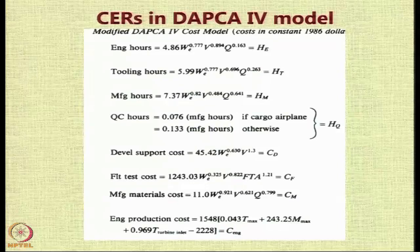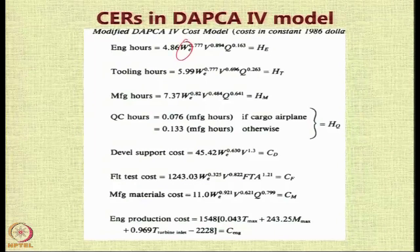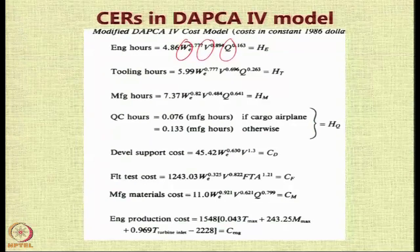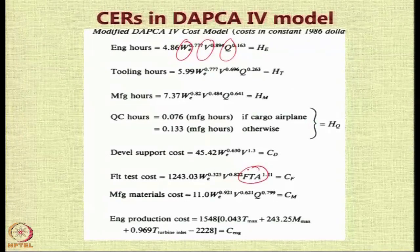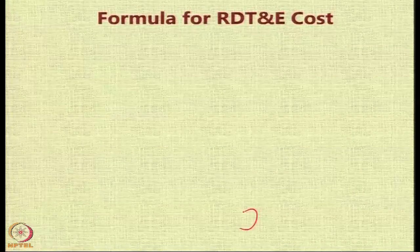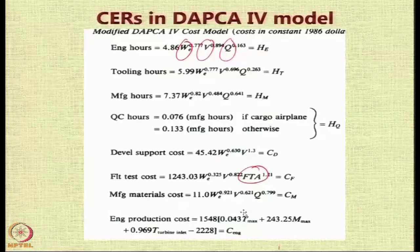What you need to understand is that the important parameters are the empty weight or DCPR weight of the aircraft, the maximum velocity, and the quantity to be produced. These are the three main factors, along with the number of flight test aircraft and maximum thrust, which all play a role.